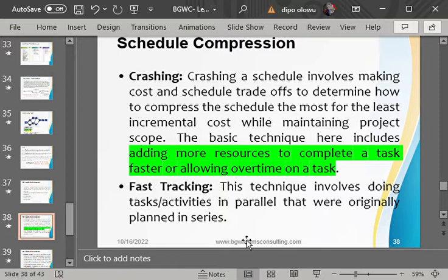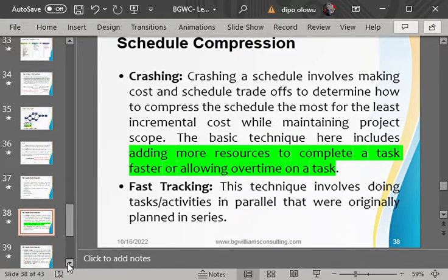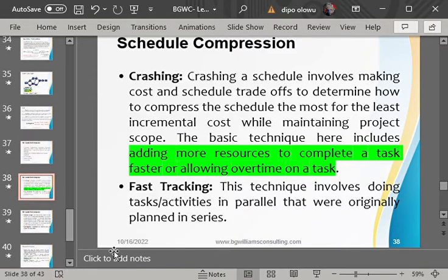Instead of saying let A start first and complete before B starts, you now say, no, we are behind time. Let A and B start first. Let them just be doing their work. Let everybody just start. That is what fast tracking is. Are we together, please? All right, so that is what fast tracking is.